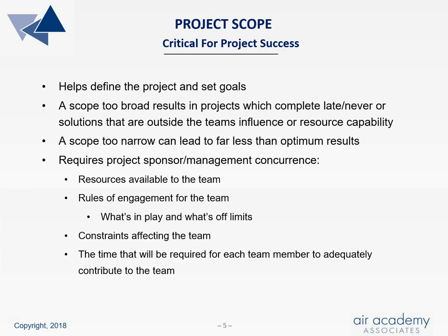Also taken into account should be the amount of time that is expected that the team members will be involved in the project. Other than the Green Belt or Black Belt, typically, members can expect their time involvement to be between 10 and 15% of their total working time. Sometimes it is less, and sometimes it's a little bit more.